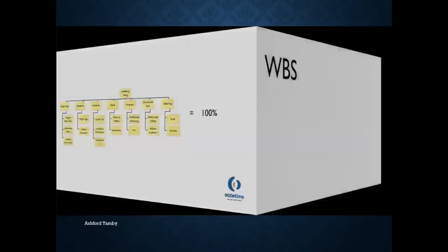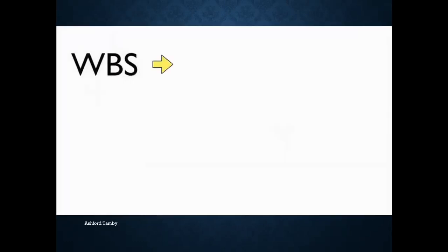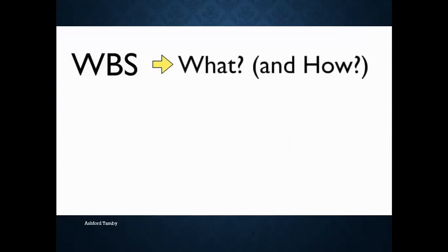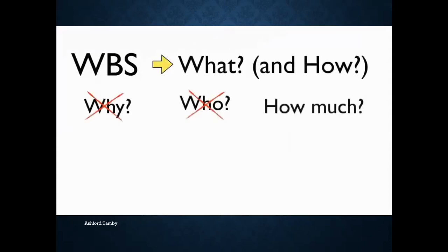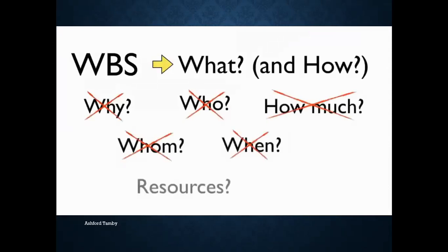When we are creating a WBS, we are answering what questions, or sometimes how questions. We are not answering why questions, or who questions, or how much questions, or whom questions, or when questions, or resources, or materials.